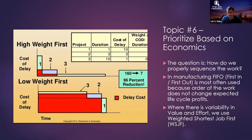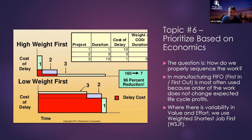Weighted shortest job first means doing those things with the highest value-to-effort ratio. That's the ratio we calculate using relative estimations — value is analogous to cost of delay, and effort is roughly equivalent to duration. That's CD3: cost of delay divided by duration. He's illustrating three items: the first has high value and low duration (10 to 1 ratio — do it first), the second has medium value and medium duration, and the third has very long duration and small value.